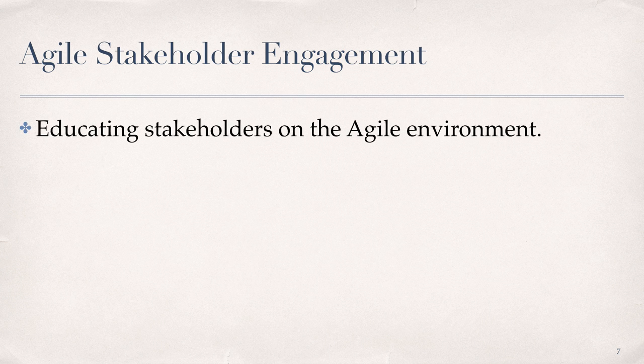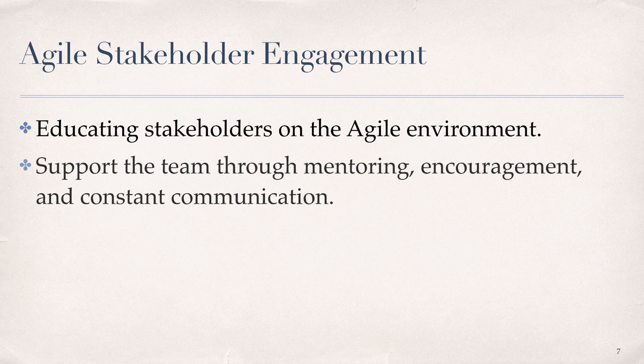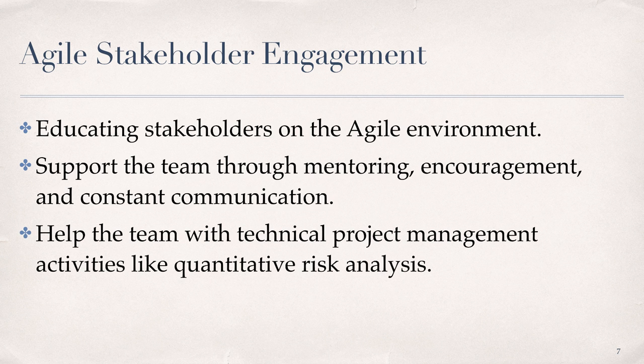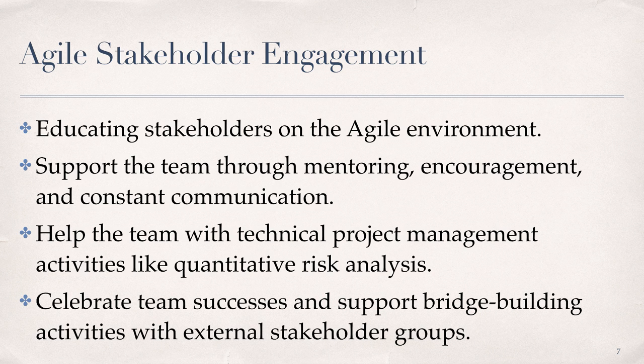Stakeholder engagement practiced by Agile servant leaders is built on managing relationships to build communication and coordination among stakeholders within the team and across the organization. When project managers act as servant leaders, the emphasis shifts from managing coordination to facilitating collaboration. Stakeholder management responsibilities in Agile include educating stakeholders on the Agile environment — including roles, events, and artifacts — supporting the team through mentoring, encouragement, and constant communication, helping the team with technical project management activities like quantitative risk analysis, and celebrating team successes and supporting bridge-building activities with external stakeholder groups.